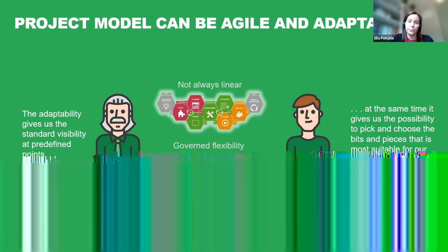And then as you go forward, every sprint, every quarterly increment, however you decide to build your cadence, that sprint decision, that roadmap decision that you do, this is what we are committing to for the next 2 weeks or whether it's for the next 3 months, that's another governance point where you provide visibility for your portfolio.